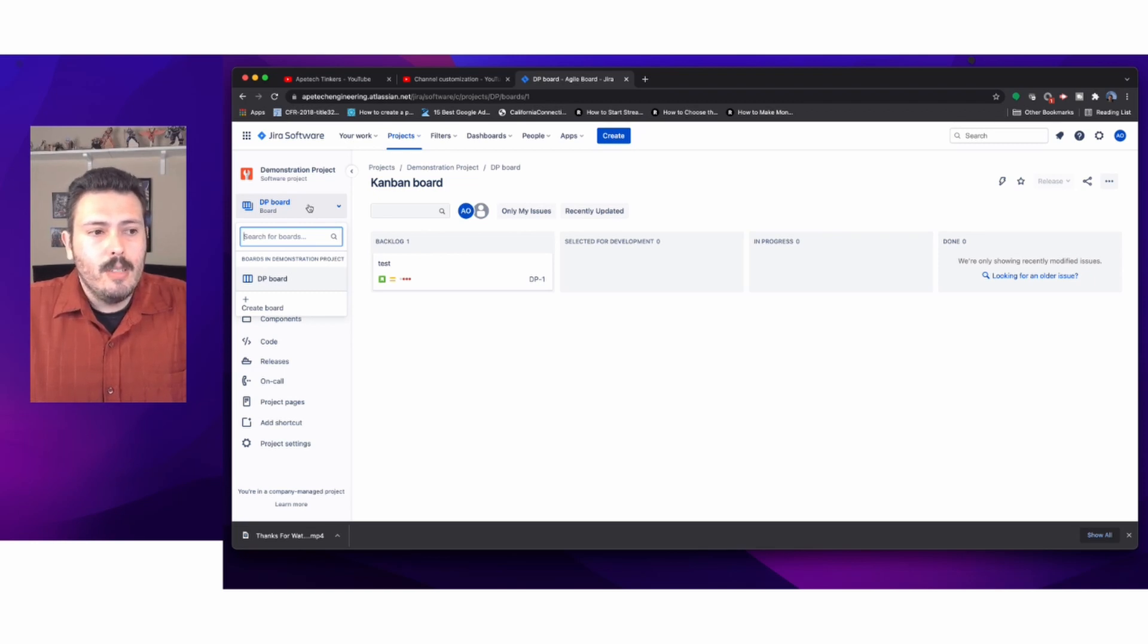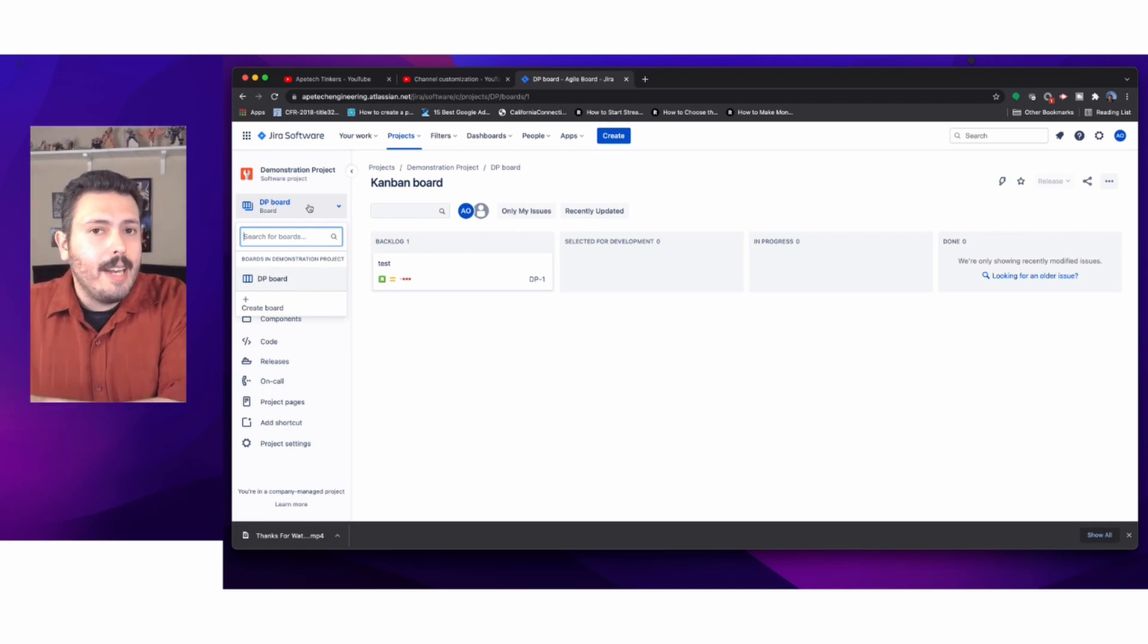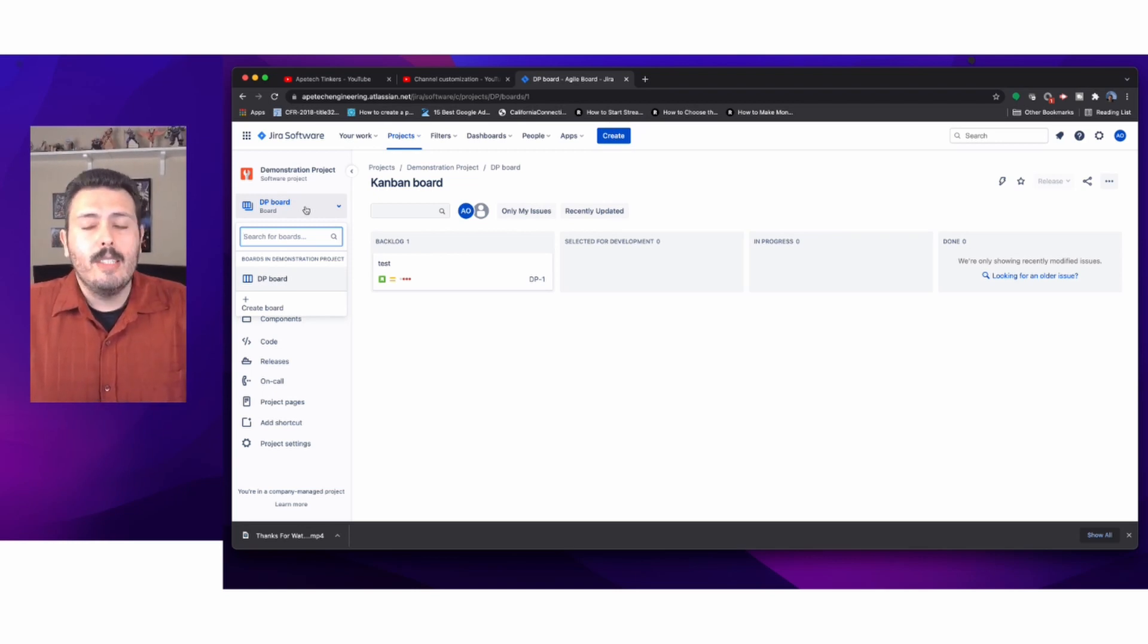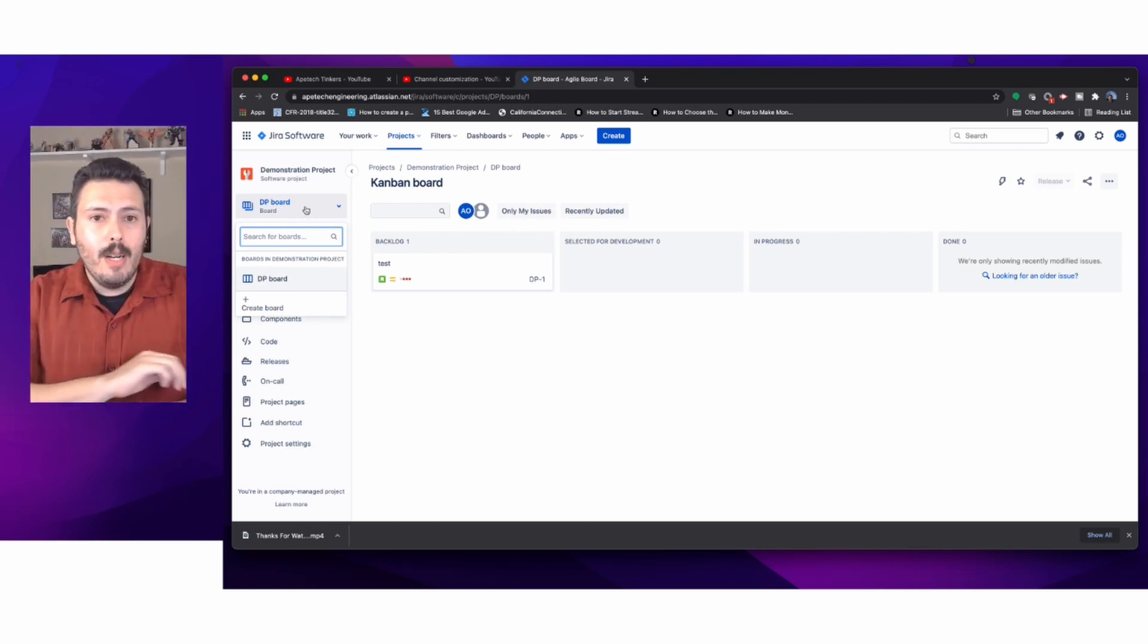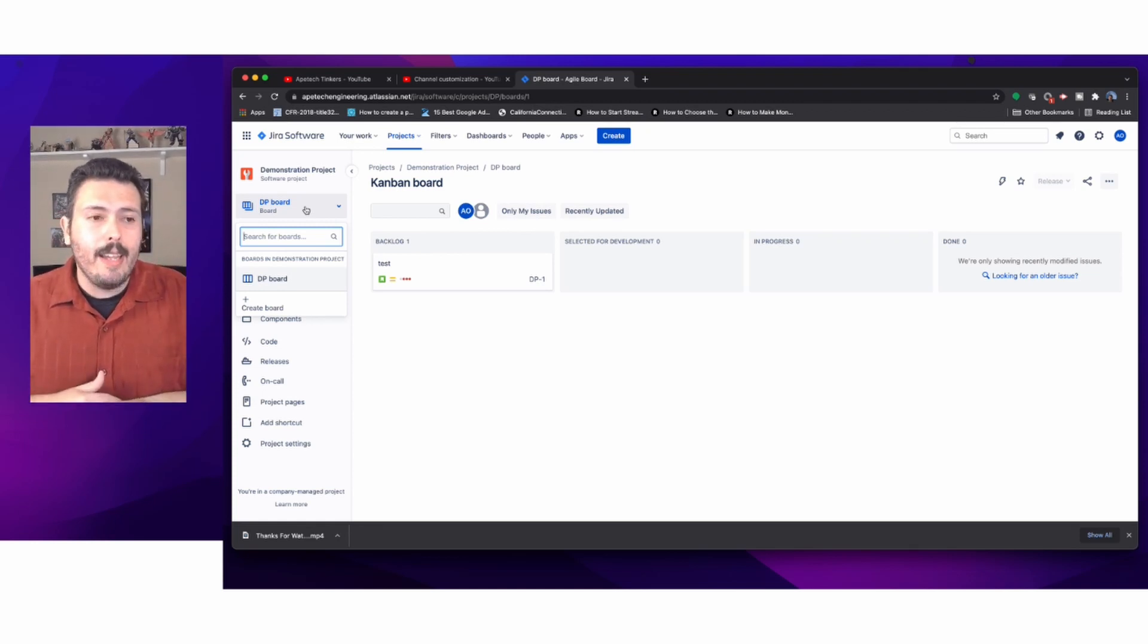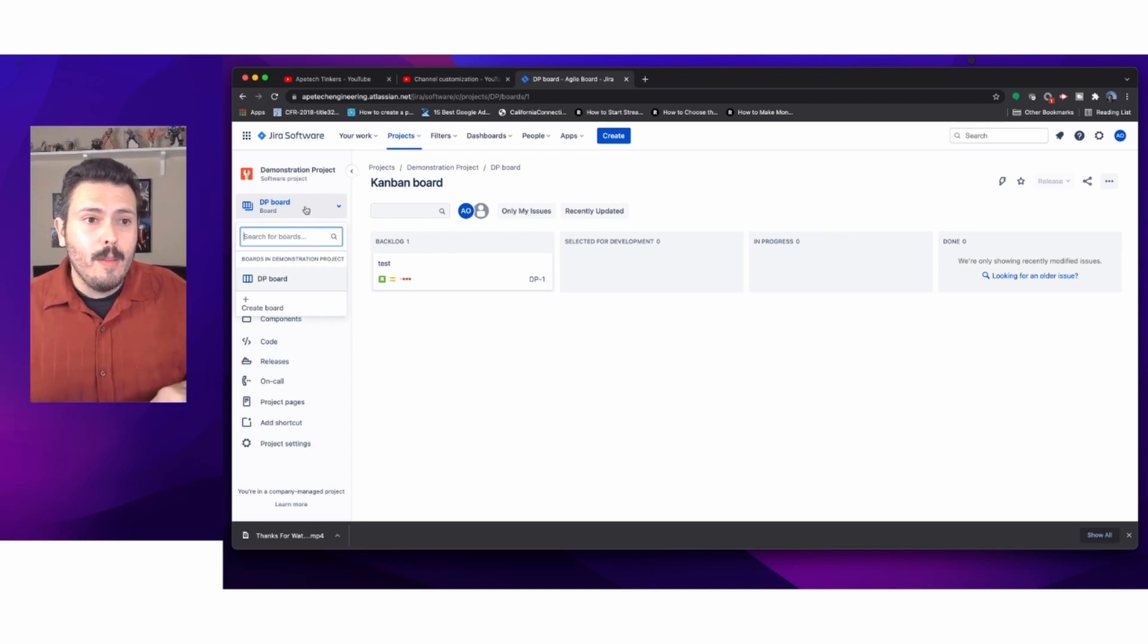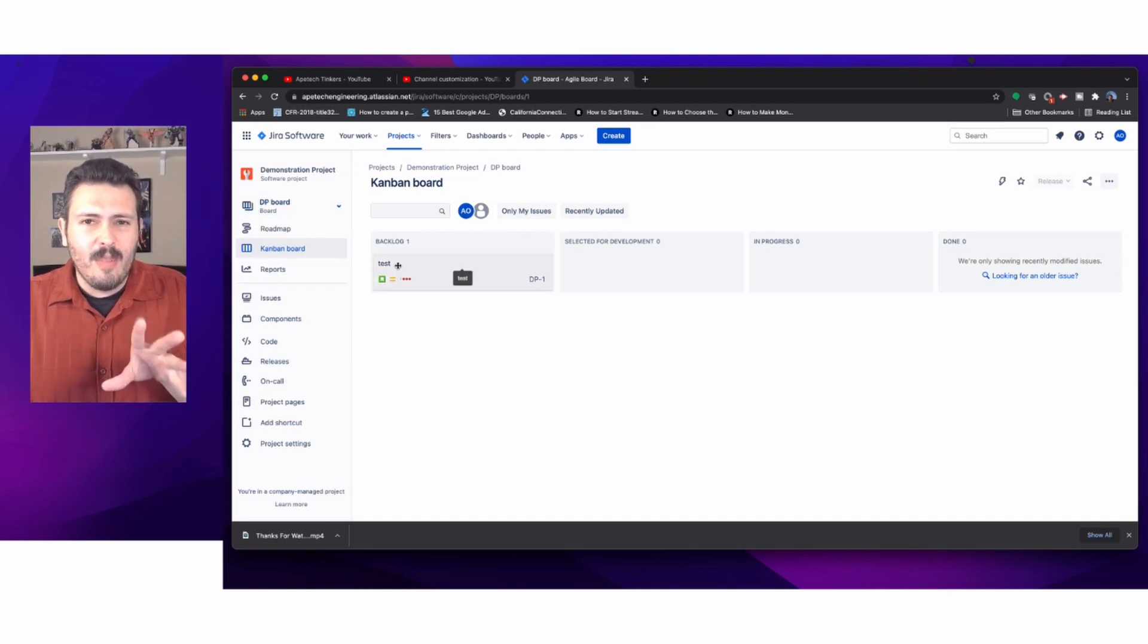What I'm going to do throughout this video is start with the Kanban, then add a Scrum board, and the next video will focus on that. You'll be able to see how I can toggle between the two boards. A Jira software project can have both a Kanban board and a Scrum board. Both are okay. There is no hard set rule that says you have to be one or the other.